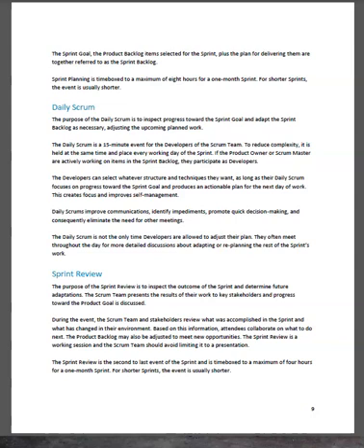The developers can select whatever structure and techniques they want as long as their daily Scrum focuses on progress toward the sprint goal and produces an actionable plan for the next day of work. This creates focus and improves self-management.